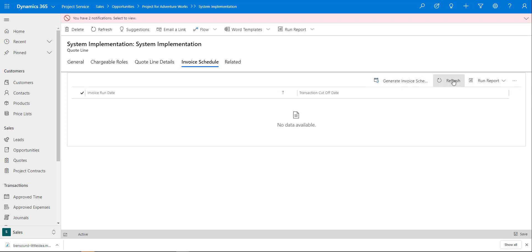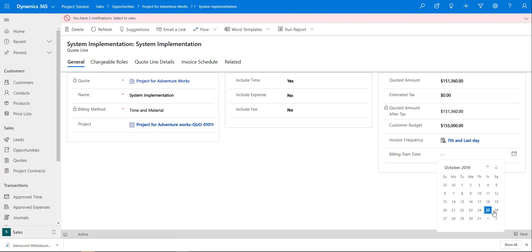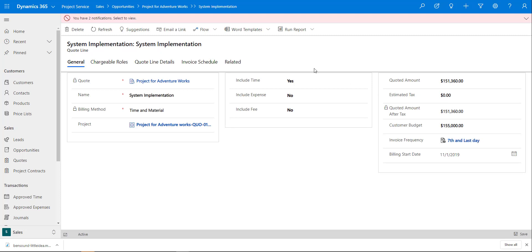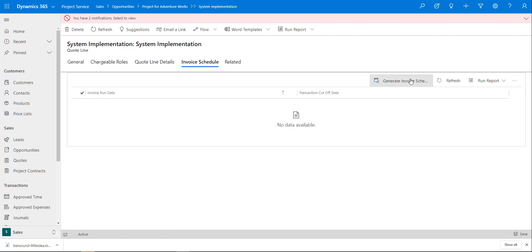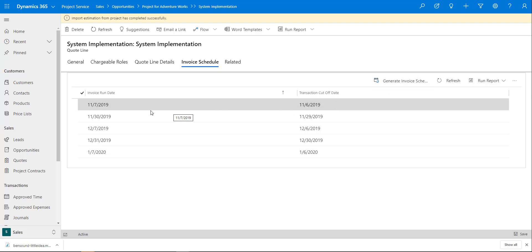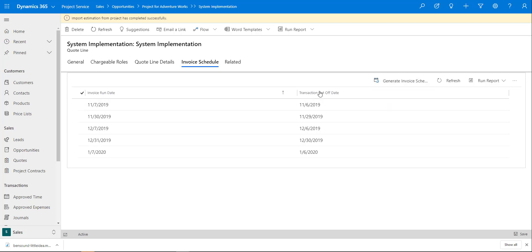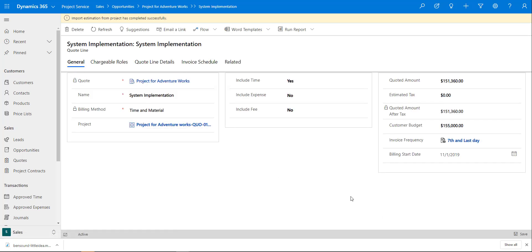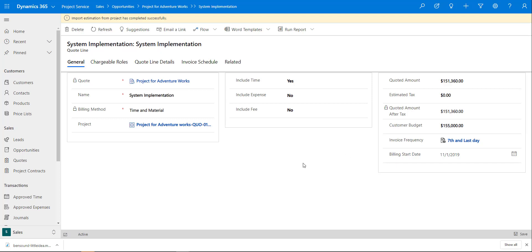My billing start date wasn't populated, so I'll set it to the first — when we're expecting the project to start. Going back to the invoice schedule and generating again, we now have the invoice run date and transaction cut-off date. Once that's done, you can see the customer budget and the fully quoted amount are automatically populated on the quote line as well. Let's go back to the quote.